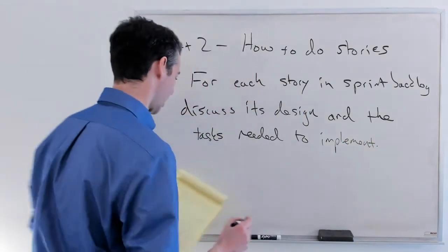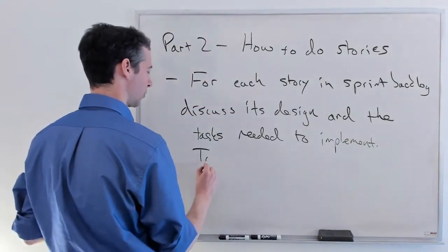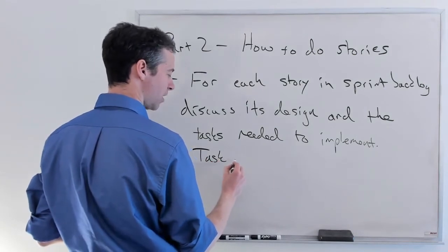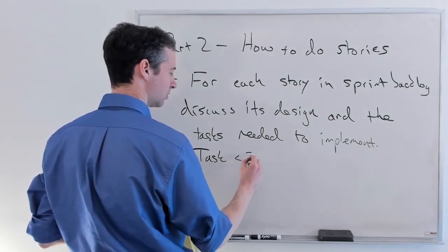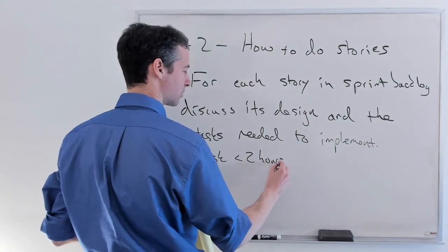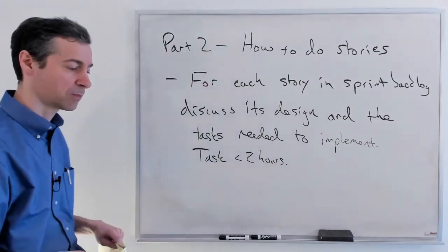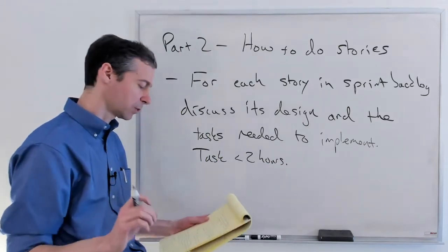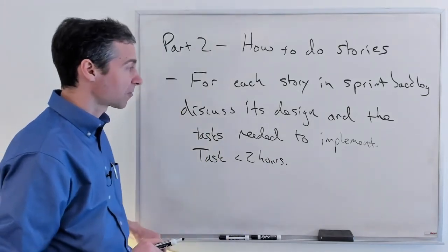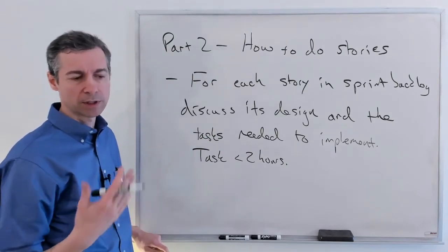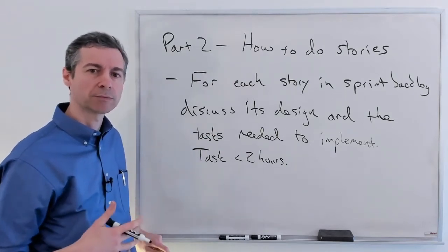Okay. We want tasks that are less than 2 hours in size. So these need to be pretty small tasks. You need to really break up things into small little chunks of work. You're not going to be able to do the complete design, but you're going to talk about, oh, we're going to need to do this to build this thing.